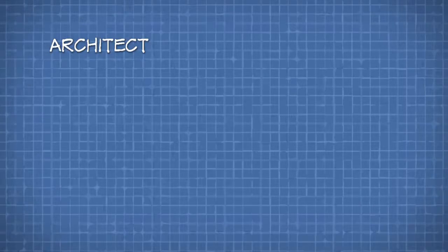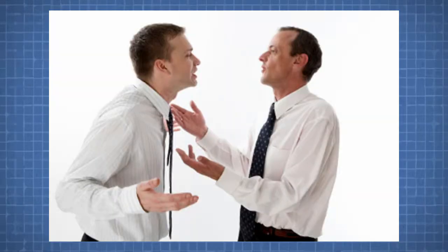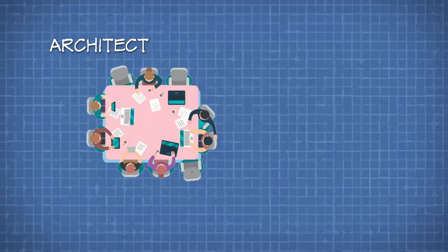Soon after that, after many quarrels or coordinations, the architect and the client come together with the quantity surveyor and the interior designer. They get to one agreement and they submit working drawings to obtain approval from the local town council. In this case, it's the Subang Jaya Municipal Council, widely known as MBSJ.